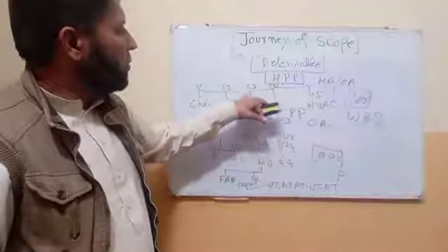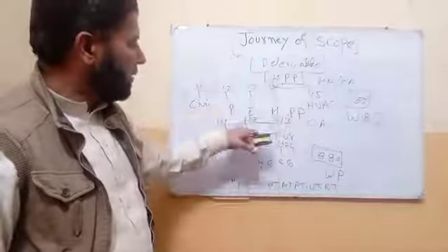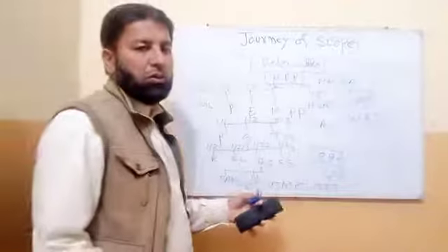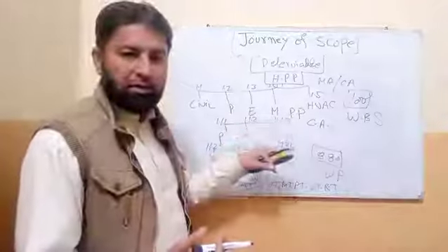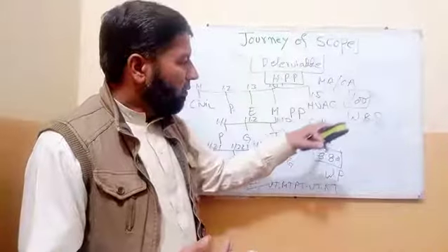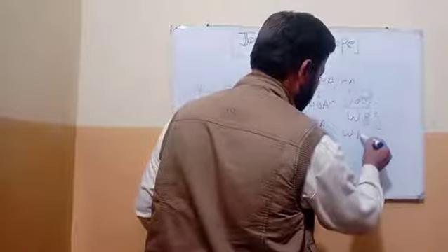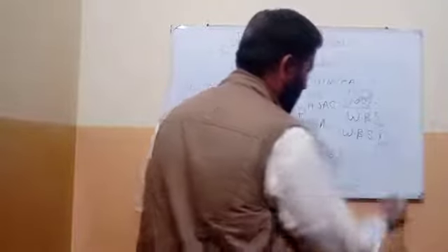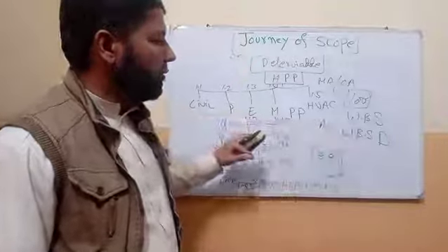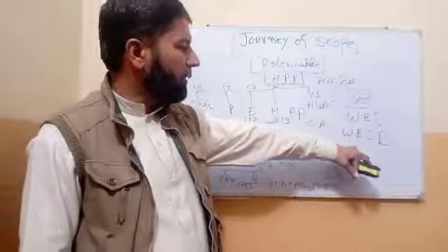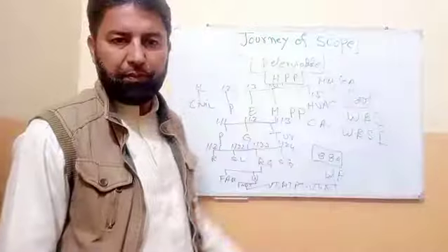If I tell you to go and work on 1.3 or 1.1.2, you don't know what it means. In order to understand these things, we have the work breakdown structure dictionary. Each and every detail regarding the WBS is mentioned in the work breakdown structure dictionary.